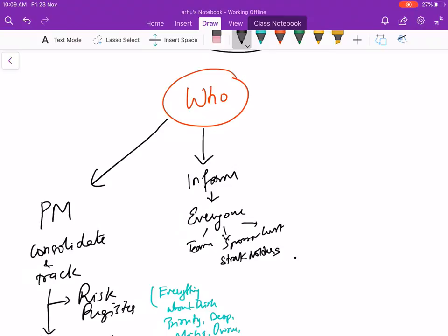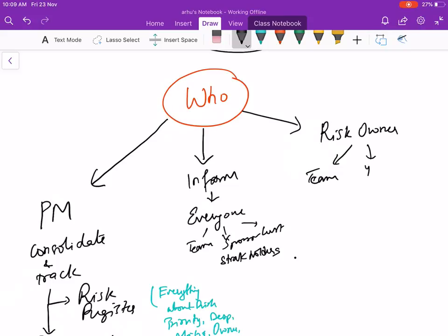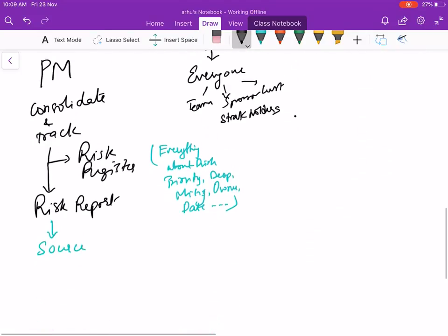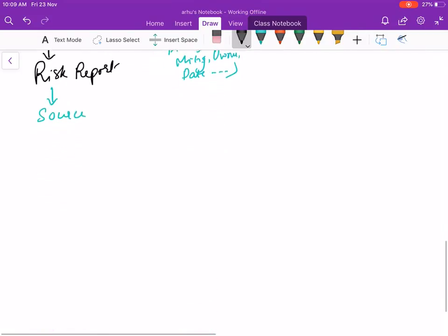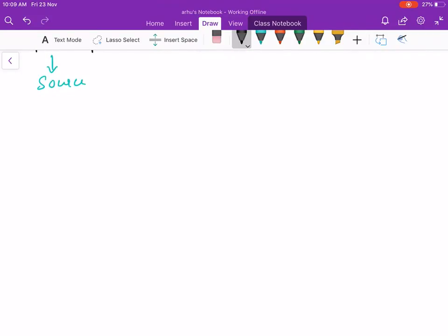Who is the owner of a risk? The risk owner could be from your own team, it could be you, it could be the client also. For example, if there are dependencies on the client like giving us licenses or access, the risk owner will be somebody from the client side.